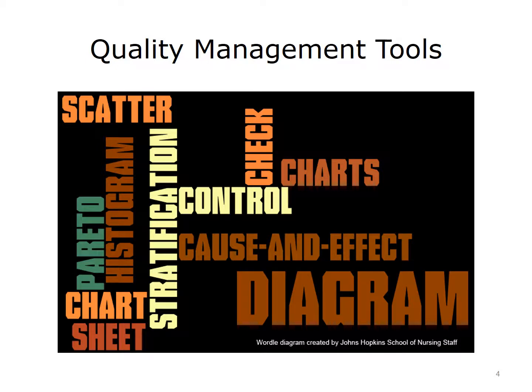These are considered the Big 7 quality management tools. 1. A cause and effect diagram, often referred to as an Ishikawa or fishbone chart, determines the factors behind an issue or occurrence and categorizes the causal relationships between those factors and their impacts. 2. Everyone is familiar with a check sheet. It allows you to gather information in an ordered format that you can customize to your needs.